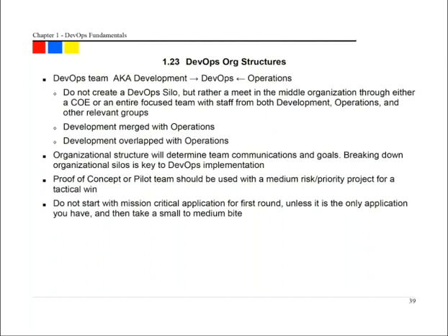If you take the approach, very common in project-based organizations, of assembling a cross-functional team which cuts across different parts of the org chart, the people on that team effectively have two masters. There's the master they have on the org chart, and there's the master they have within the project team. That can be confusing for communications, and it can be confusing for incentives. Being aware of that is an important piece.